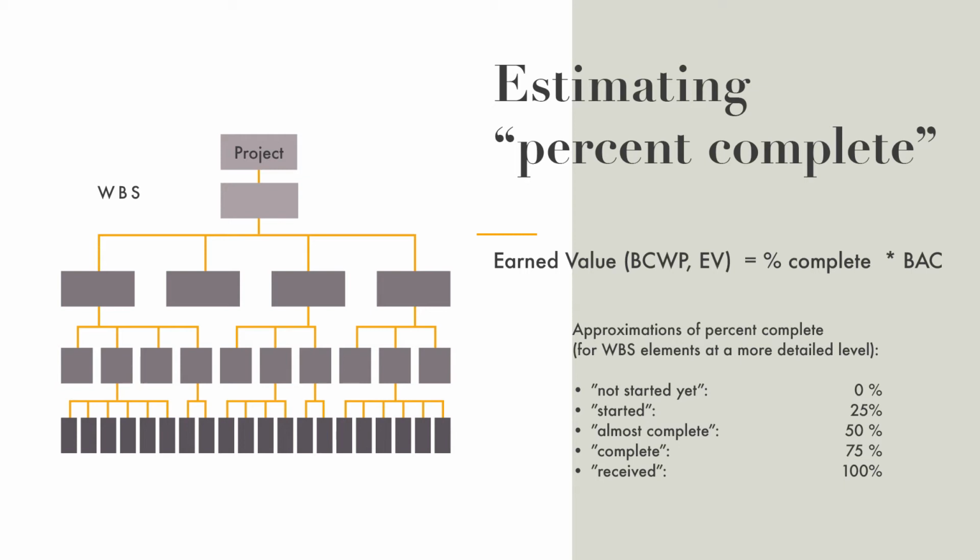And from the bottom up, from those small activities, by having this kind of robust way of calculating the earned value or percent complete, we can then sum up at the total project level, and we can have a fairly good estimate of the whole project's percent complete.